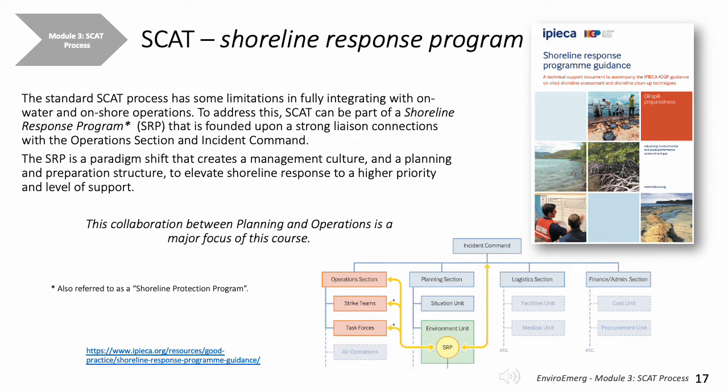Shoreline response planning has been assigned to the environmental unit with the implementation of strategies and tactics to the operations section. On occasion, this has resulted in accountability and communication issues. A shoreline response program provides a single source for information and the data related to shoreline impacts, treatment recommendations, tracking the progress of operations, as well as creating direct communication links between SCAT, the environmental unit, incident command, and most importantly, field operations supervisors and crews conducting the response activities.